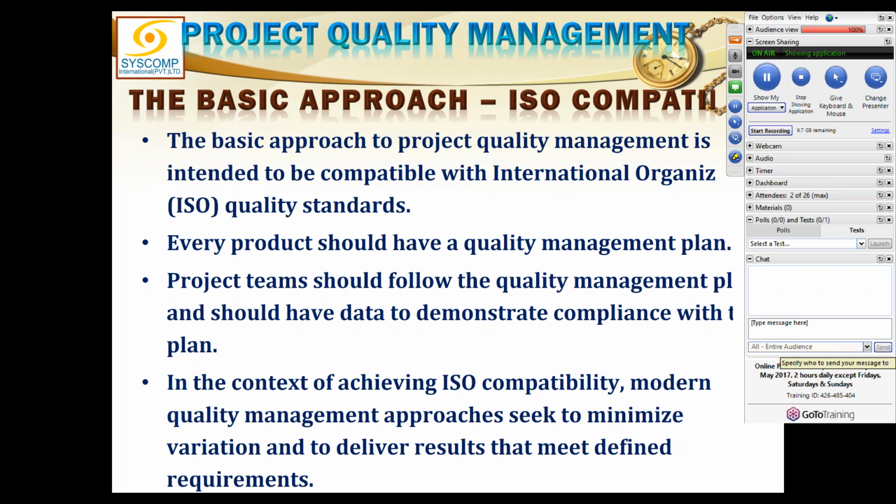If it is 2005, I will accept it. If it is 1995, I will accept it. But anything beyond these two limits is not acceptable. That would be out of quality. That is not my quality requirement. So defining the acceptable limits is the description of the quality. The definition of just 2000 psi is specification, a functional requirement. Got it or not?